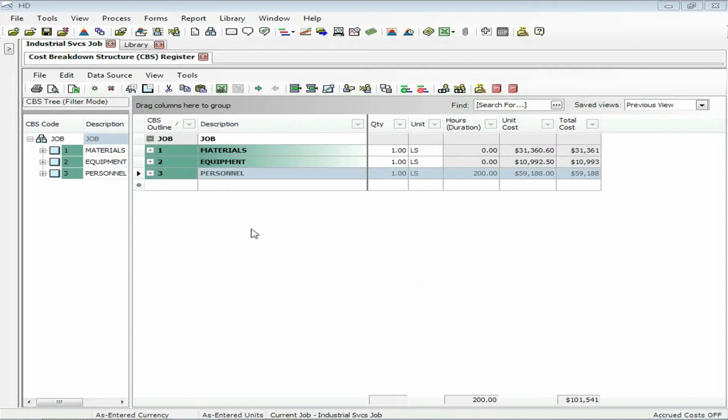And mainly what it does is it's really geared towards companies that are producing estimates using billing rates. So for any kind of services work or maintenance work, anything where T&M work, change order work, anything where the contractor is going to produce a proposal to their customer that shows their outside billing rates for their resources instead of coming up with a cost plus profit scenario.